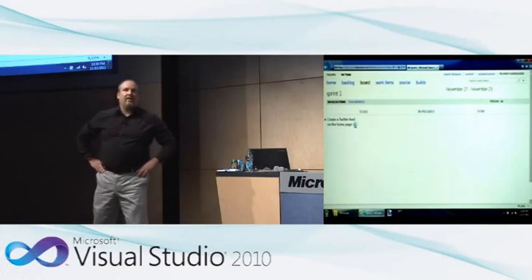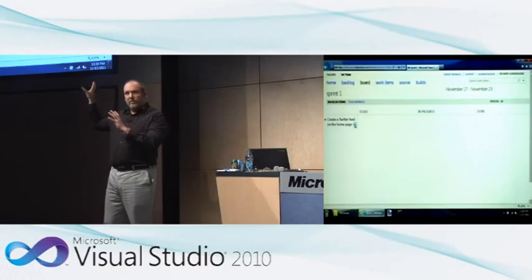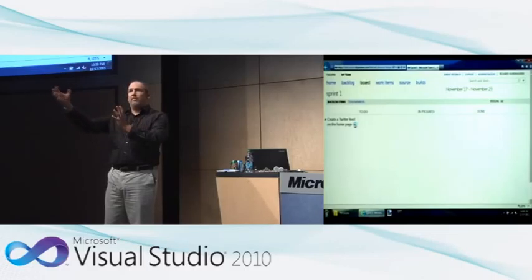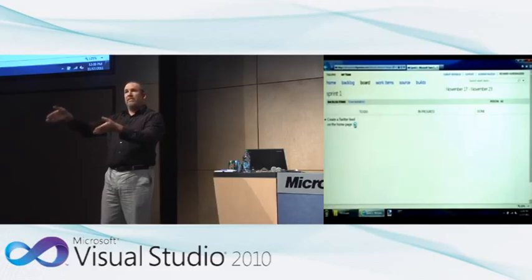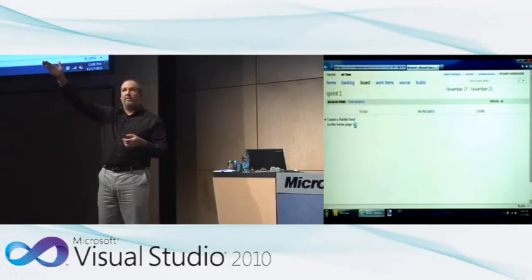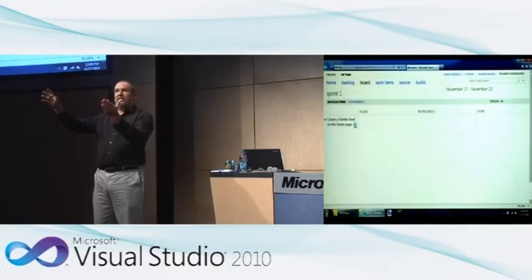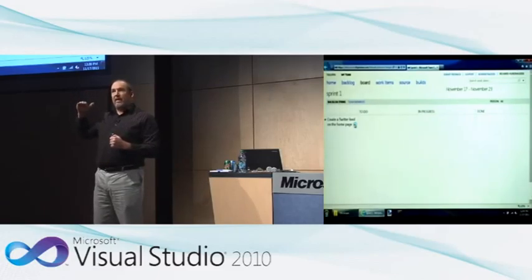So the question is the capacity planning tools there. What's the scope of those tools? And it's for the team members. You actually set up the capacity of the team members. We may only have the database person for 2 hours a day, and we know that Thursday and Friday of this particular sprint, he's gone. So you can get all those down to a number of hours for database activities available. It's for the sprint, yeah. It's for the scope of that screen right there.